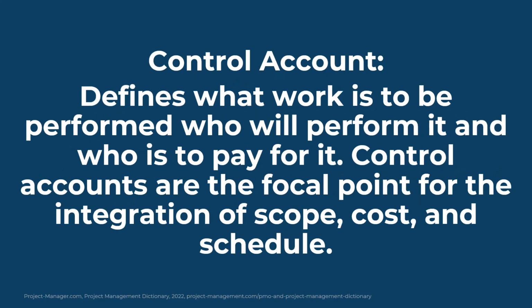A control account defines what work is to be performed, who will perform it, and who is to pay for it. Control accounts are the focal point for the integration of scope, cost, and schedule. Although control accounts are often associated with the earned value method, most organizations simply use a control account to track costs and components of a project.